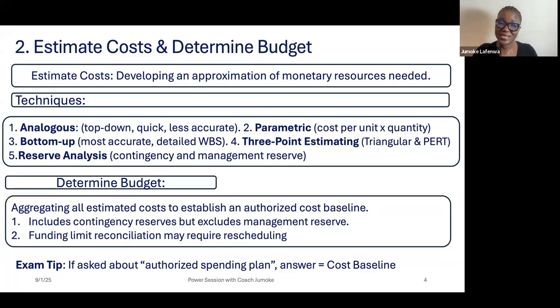If you continue on this trajectory, there will be a cost overrun, and then there will be a schedule overrun, because at the 3rd month, you should have completed 3 rooms, but you haven't. Okay, so the figure, the 60,000 we are talking about, is the cost baseline.